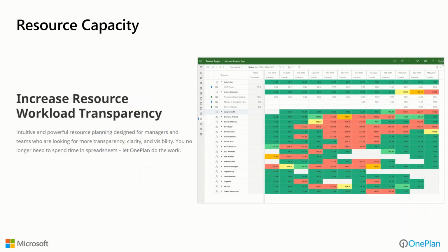Resource capacity planning, where we want to look at maybe early on high-level capacity of what resource types we're going to need in order to see, do we have the bandwidth to actually fulfill on these projects, and then ultimately replacing those with the individuals that are going to have to work on that. Being able to flexibly plan on a time phase basis what we've originally committed, maybe look at what's being scheduled in detail, and then possibly even capturing what's in a timesheet and look at how we're actually spending those resources. Very detailed resource management capability provided by OnePlan added to the mix.